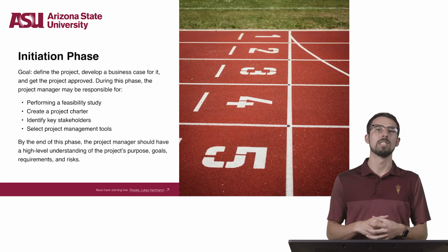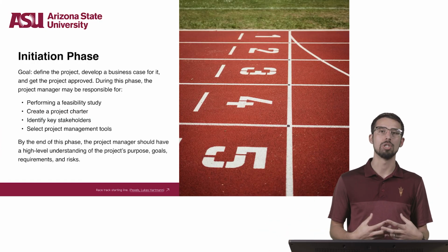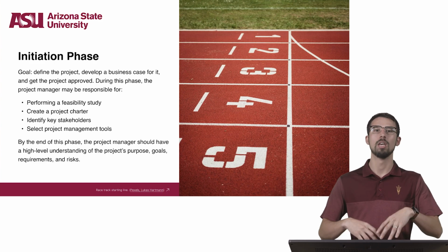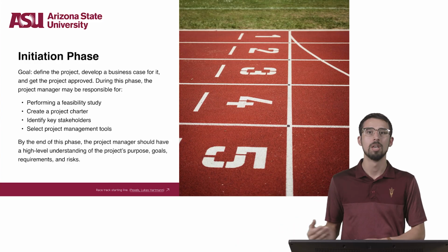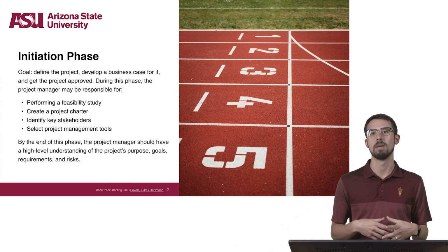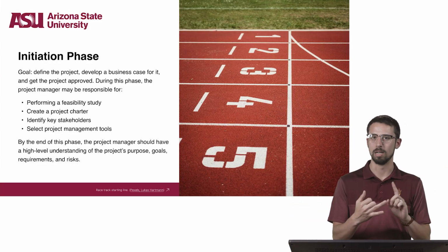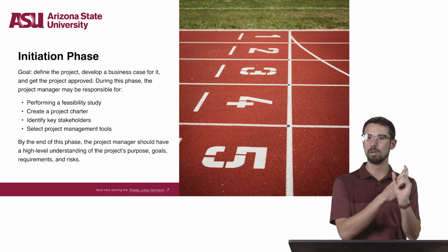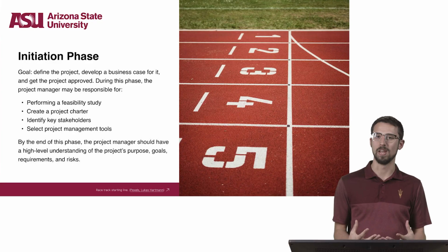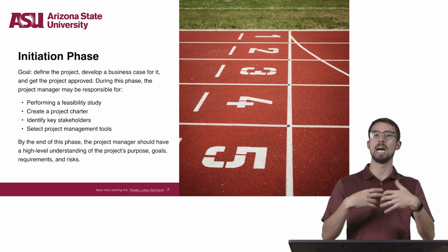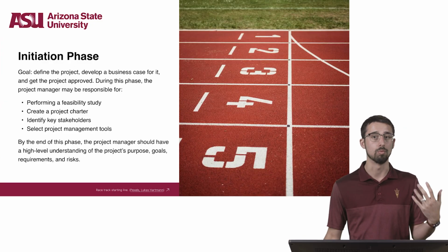The initiation phase is the first phase of the entire project management lifecycle, and the goal of this phase is to define the project. You'll also develop a business case for it and hopefully get it approved. During this time, the project manager may do any of the following: perform a feasibility study, create a project charter, identify key stakeholders, select project management tools. And by the end of this phase, the project manager should have a really high-level understanding of the project's purpose, goals, requirements, and risks.